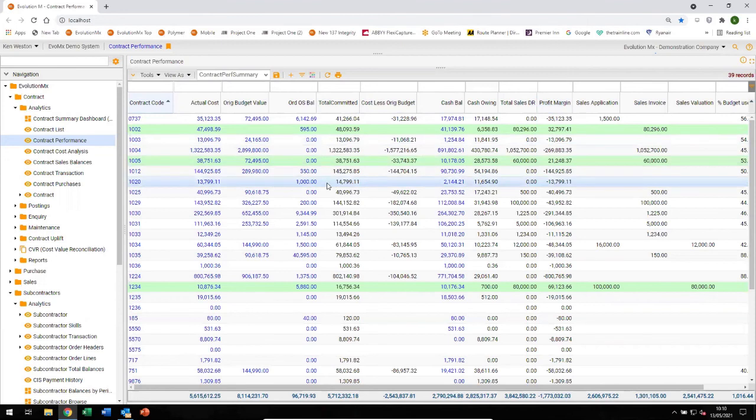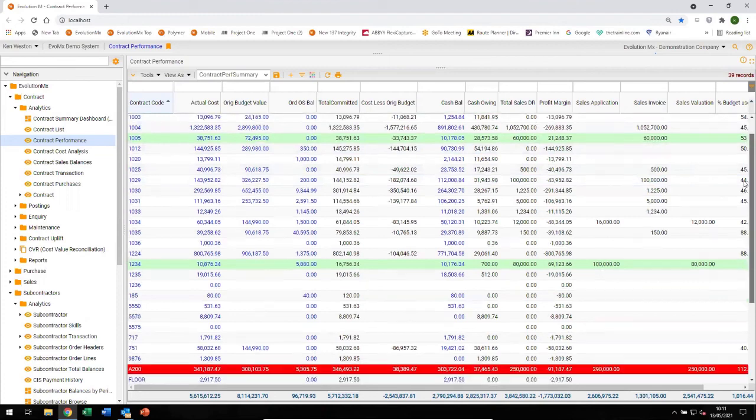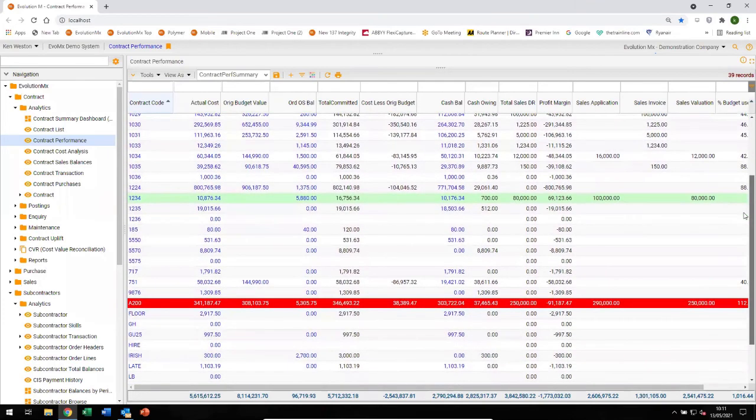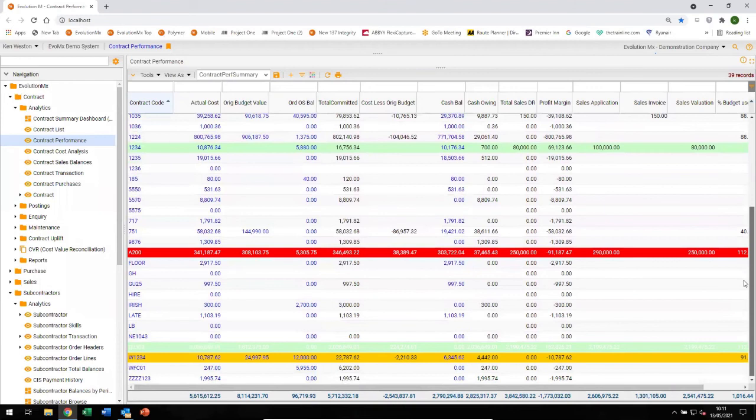We're using colour coding here as well to indicate that the green lines are telling me that there are contracts that are making me money. Slightly worrying that I've only got 3. That's just checking on the profit margin column, and where that's greater than 0, we're saying colour the line in green. You could have alternative or additional rules being shown differently. So a red line could show you contracts that are over budget. Orange ones could be contracts that are within 90% of their budget.